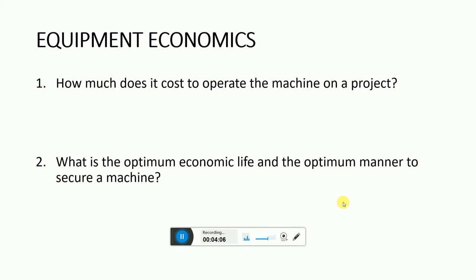So the production cost we can get simply by dividing these two figures. Similarly, the estimators or the planners can use the cost per cubic yard to figure directly on the unit price. For example, on a lump sum project, it will be necessary to multiply the cost per unit by the estimated quantity to obtain the total amount that should be charged.